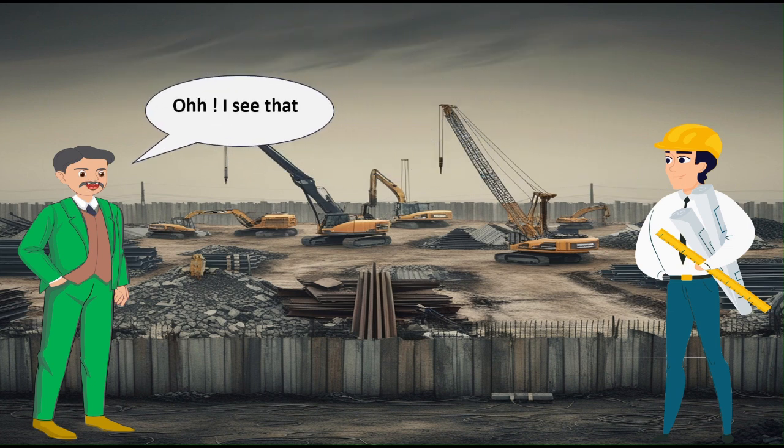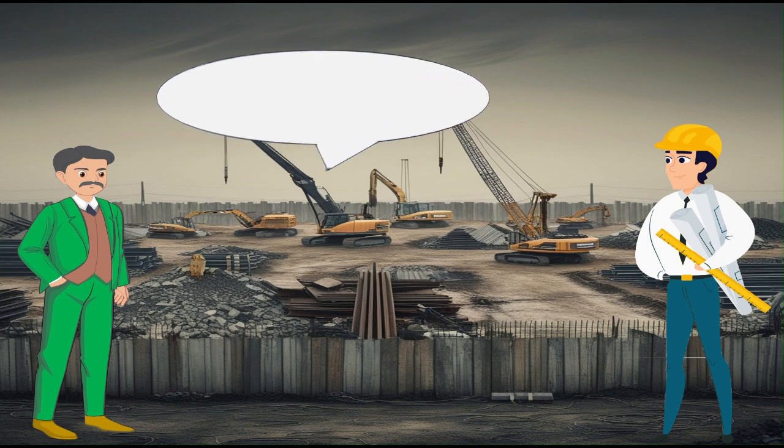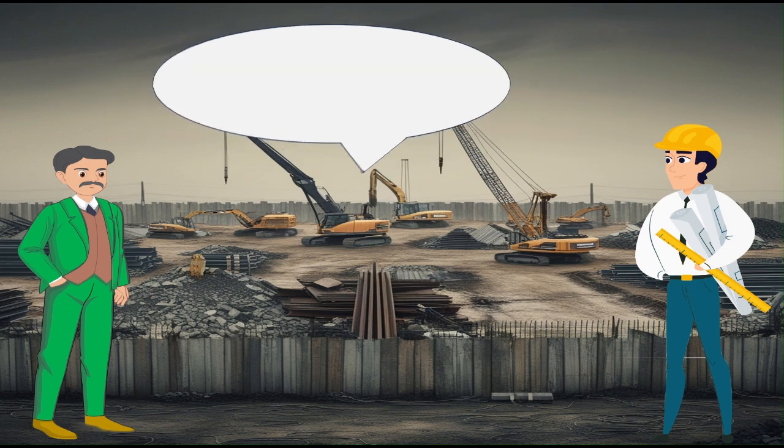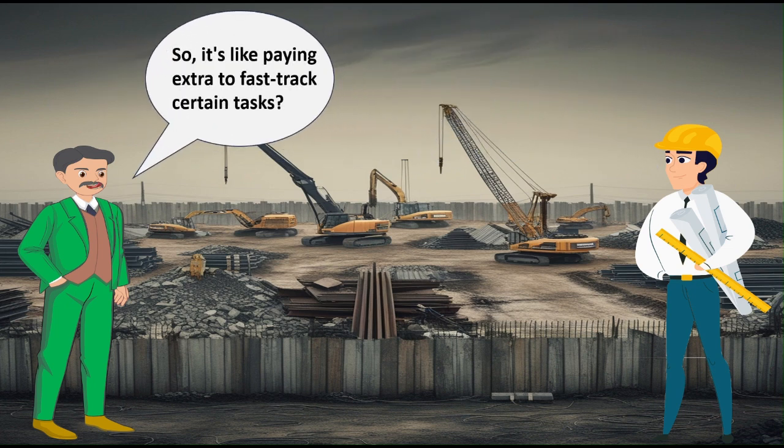Oh, I see that. In construction management, crashing refers to speeding up the project, which increases the project costs, while slowing it down may save money. In your case, it is necessary to complete earlier than the scheduled time, so crashing is the only option. So it's like paying extra to fast-track certain tasks.